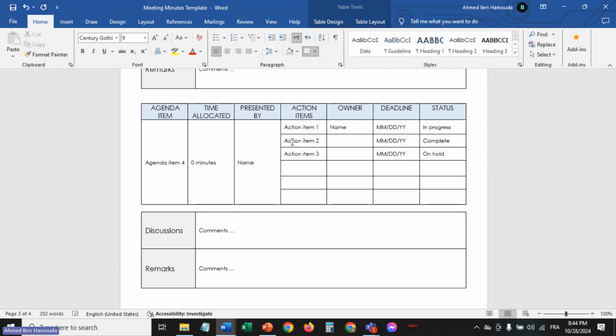And if you do not object within 48 hours, or do not send a request for rectification or changes, then they are considered approved and agreed. I know that sometimes some people will still object even after the 48-hour deadline, but still, it saved me 90% of the time, really.